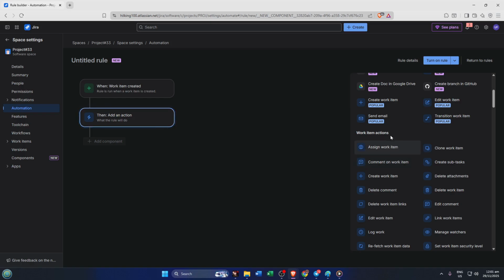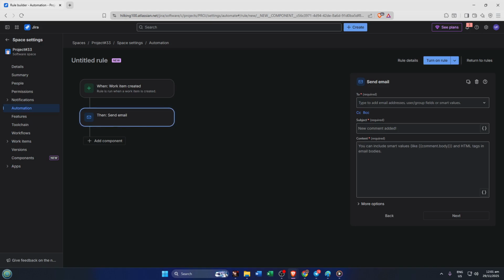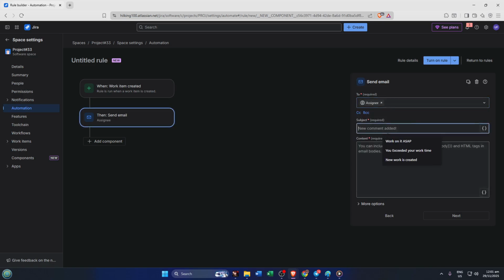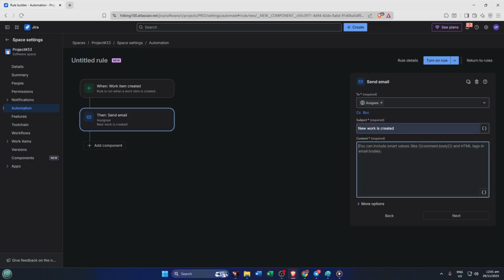This is where it gets a little tricky. On the configuration screen, you'll need to look under the Assign Issue to drop-down menu and select Project Lead. Don't forget to save your work. If you wish to add a condition to the mix, like only assign if the issue type is task, you could add a condition component between the trigger and the action.